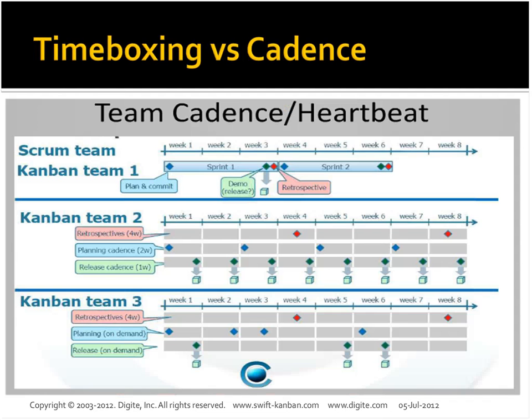Kanban says that you can obviously do time boxing if you wish to. So Kanban has a fairly non-prescriptive approach, saying you could continue to do that. But it also says that if you want, you could also build a cadence. For example, you could do your sprint every 2 weeks, and you do your sprint planning every week. What is stopping you from doing some sort of planning every week, so that it builds up for your sprint